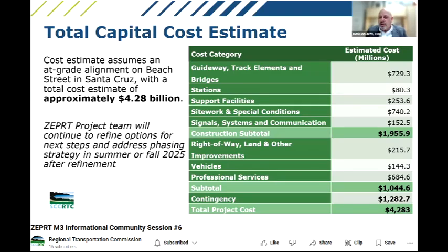I noticed that one of the questions that came up already was the question of the bridge conversation. And I think maybe that's a good way to explain this estimate, because you will recall when we presented the bridge rehabilitation and replacement cost estimate at about $980 million. It was broken into a couple of components. Those components were, first of all, the construction of the bridges themselves and all of the associated work that is included in the field for actually building the structure.